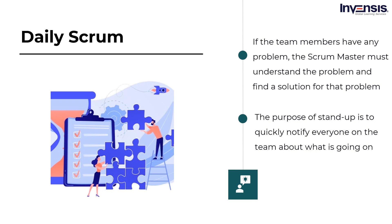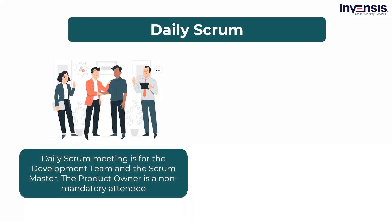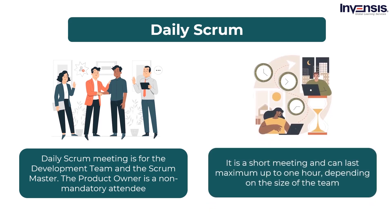There is implied accountability in disclosing the work you performed yesterday in front of your team. Nobody wants a team member who is always doing the same thing and not making any progress. This meeting is for the development team and the Scrum master. The product owner is a non-mandatory attendee; however, the product owner can join if they want to know how the team progresses. This is a short meeting and can last up to one hour, depending on the size of the team.